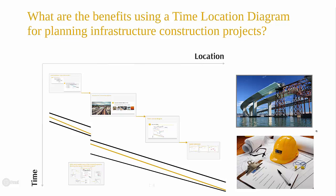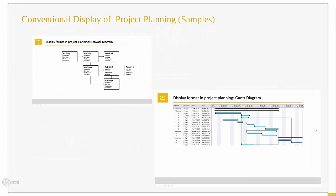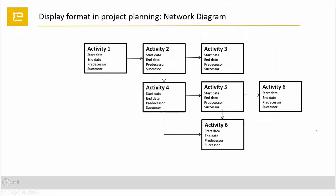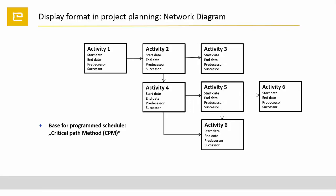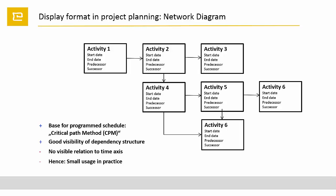At the beginning, just some words about conventional scheduling display. The network or PERT diagram displays activities in boxes and delivers the base for the critical path method, the commonly used method to calculate the shortest way in a schedule. The dependencies displayed as arrows are showing the process structure very nice. But as there is no direct visible relation to the time axis, the understanding of a network diagram is poor and abstract. Hence, there is a small usage of network diagrams in practice.